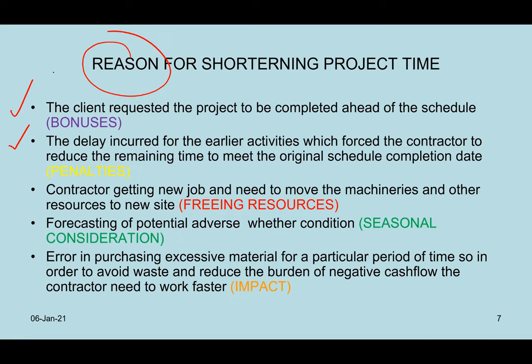But you notice that, let's draw something here. Let's say this is 2 years. This is the first year. In the first year, the contractor is supposed to complete almost 50%. Let's assume that way. But due to the COVID situation, the contractor only managed to complete 50% of half of the 1 year of works, meaning only 25%.